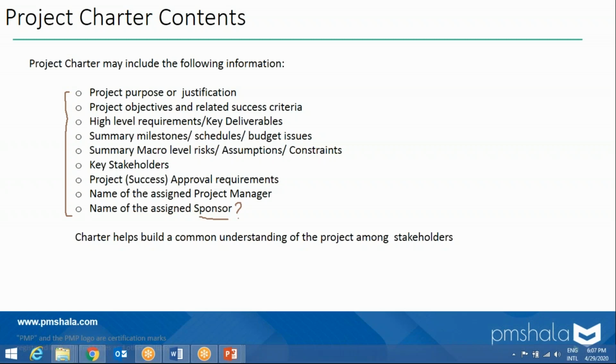If I have to count the detailed responsibilities, these are some. Arranging funds for the project. Who is going to arrange funds? None other than the sponsor. More, all major decisions would be with the sponsor. Small decisions could be left to the project manager, but major decisions should go to the sponsor. All major approvals lie with the sponsor. Approving the budget, the timeline, scope, everything, the sponsor is required to approve.